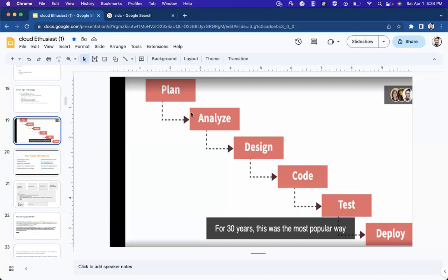And at the end, you will now have a retrospective. A retrospective is what you discuss sometimes in a week. Okay, this is what we have done. These are the challenges we had. This is how we were able to overcome these challenges. This is what we are going to do. You understand me? Those are part of the Agile process. You can see it becomes more interesting, more fun. Like me, I enjoy working in an Agile environment more than all the years that I worked in Waterfall.